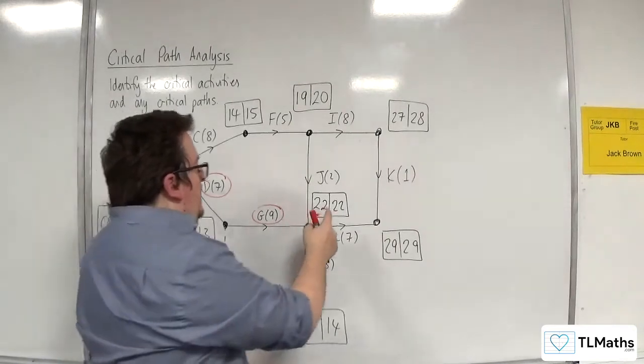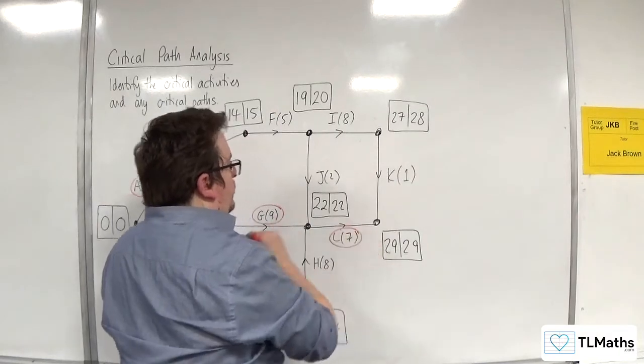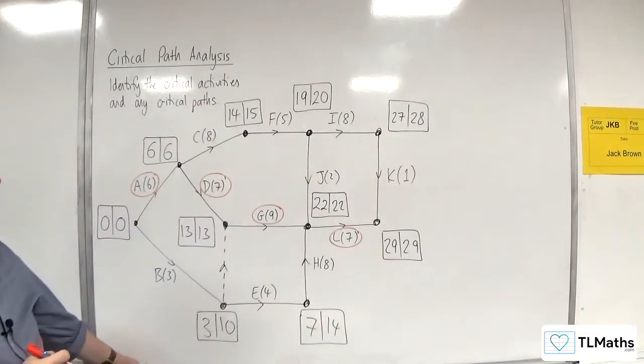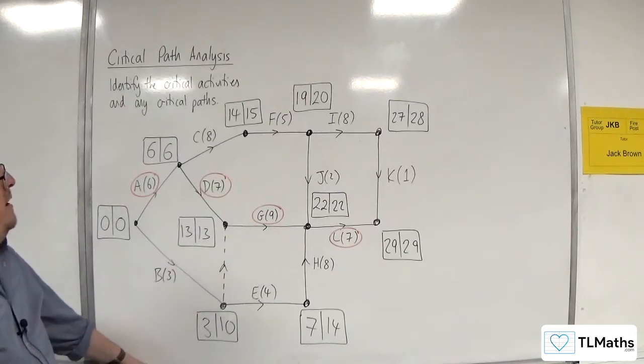Then you've got 22 plus 7 is 29. And you've got the pair, so L is also critical. Now, are there any other critical activities? Quick look around. No, there aren't.